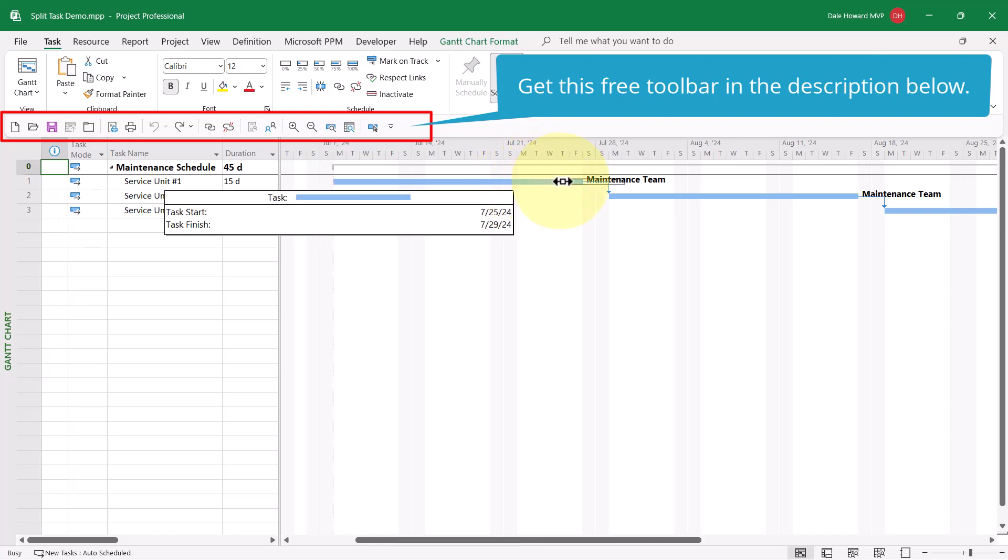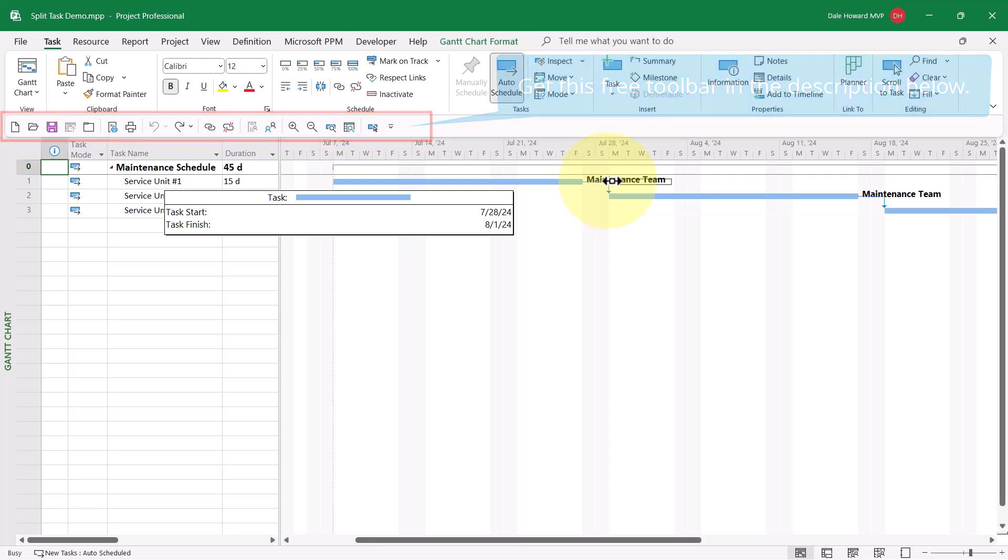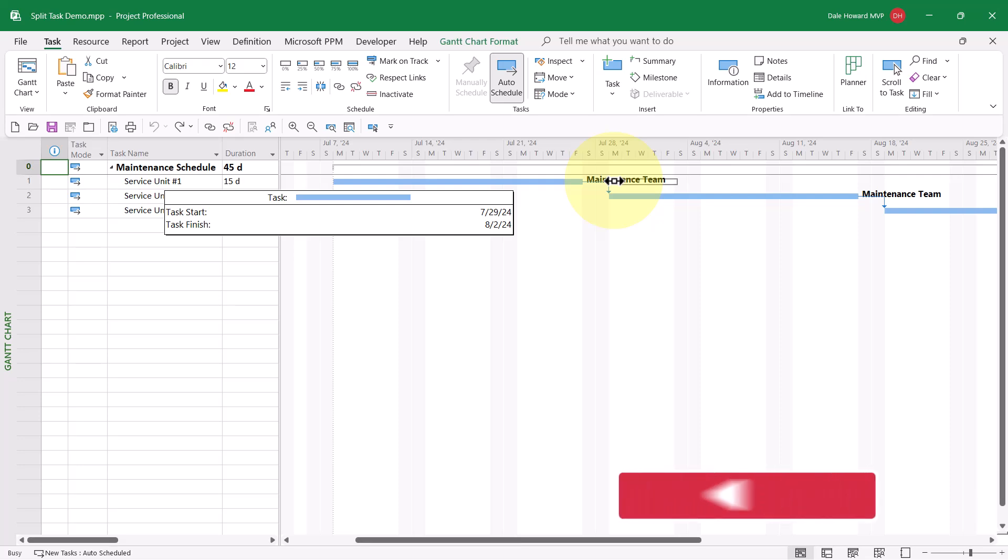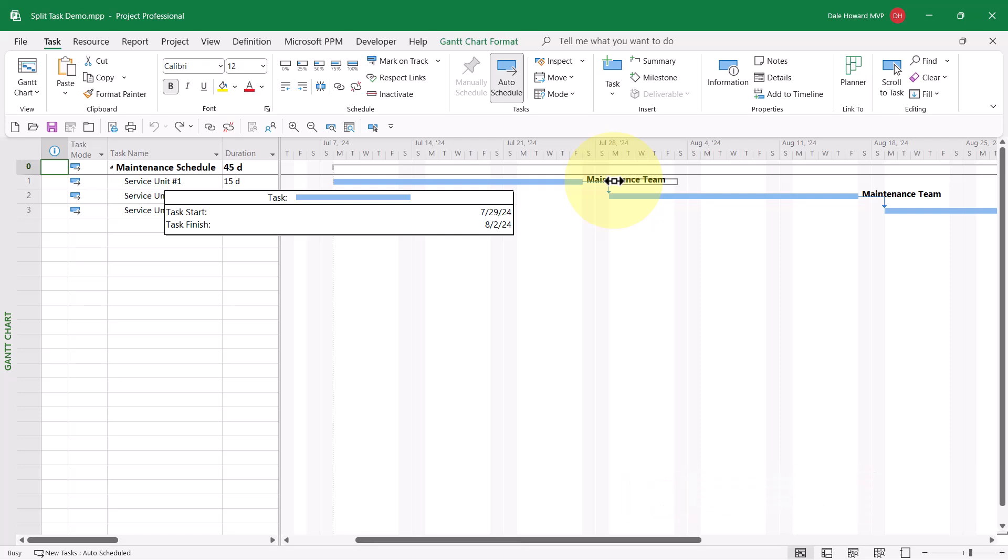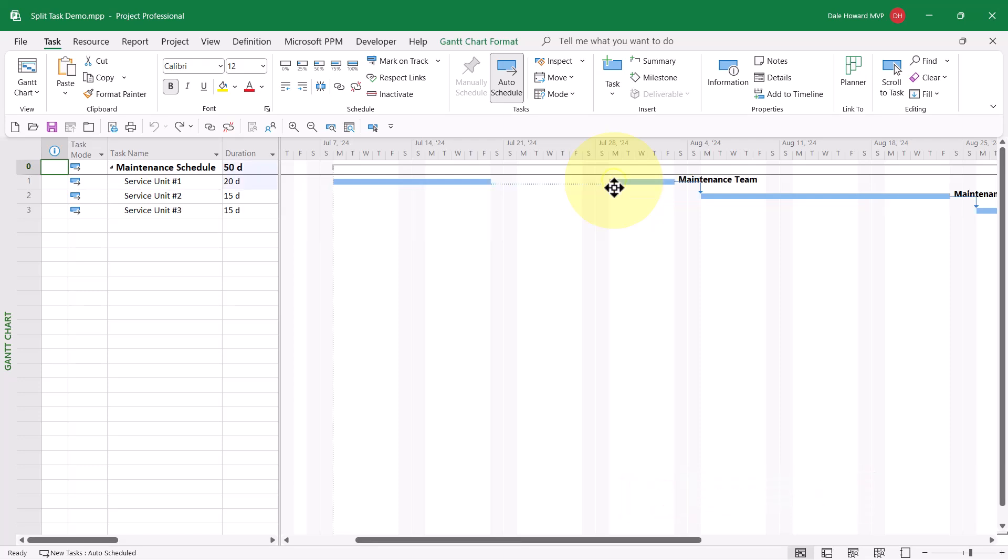And then I can drag it to the right. In the floating tooltip, I can now see the task start, this portion I have grabbed. I can see the task start is now July the 29th. When I release the mouse button, Microsoft Project splits the task.